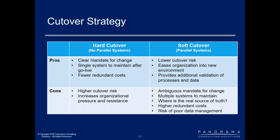and doing what I've called a prior period parallel, where you're looking at a prior business month's results and executing those and making sure that you understand how the new system is handling those transactions and identifying any discrepancies there. Making sure you reconcile what the new system is telling you to what came out of your old system for that particular business month, for that particular business unit.